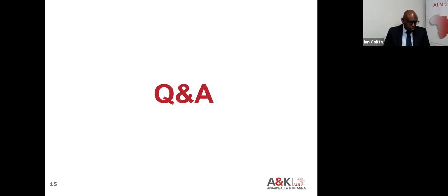Then there's a question here with regard to completion mechanisms. I think the point there is that, as we say, the JDA is intended to deal with that time in the project life cycle where you do not yet have shares in the project company, or it hasn't been properly constituted, but there's a lot of development work happening with respect to the project. So essentially what you're trying to do is to lay out the roadmap to say, what is happening in terms of the development, and two, what is our eventual equity structure and how will we get there? And so some of the things you want to clarify is, for example, at the JDA stage, what will be the relative contributions of each party and what will those mean in the eventual shareholders agreement?